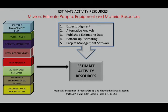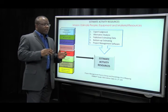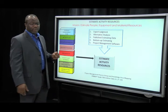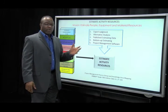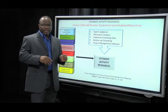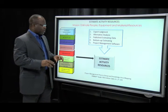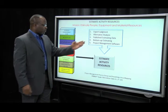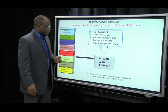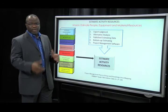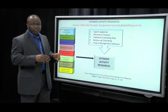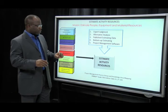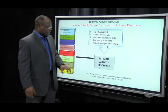We have bottom-up estimating, which enables us to break down a task into lower levels to better understand the task and better estimate the activity resources. If you've got a very difficult-to-understand task, break it down into lower levels, then add up how many resources you need and roll that up into a total — that's bottom-up estimating. Project management software like Excel, spreadsheets, and Microsoft Project can also be used to estimate activity resources.